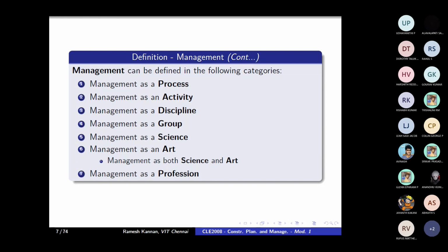We mimic the actual processes or activities in terms of different modules, and then we provide time as well as some cost data to each activity. Then we analyze which activity takes longer, or which chain of activities, called the critical path, determines the project duration.